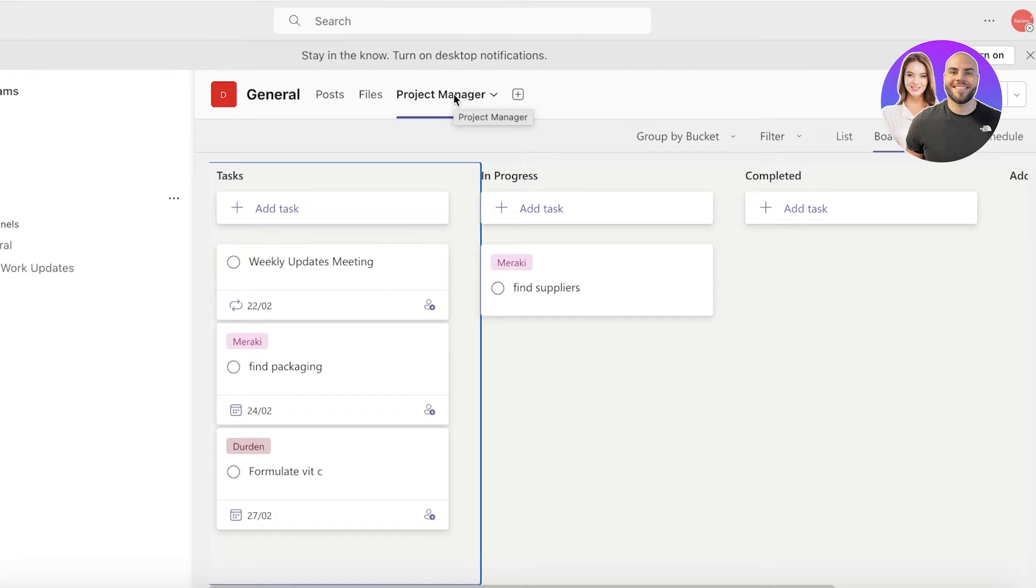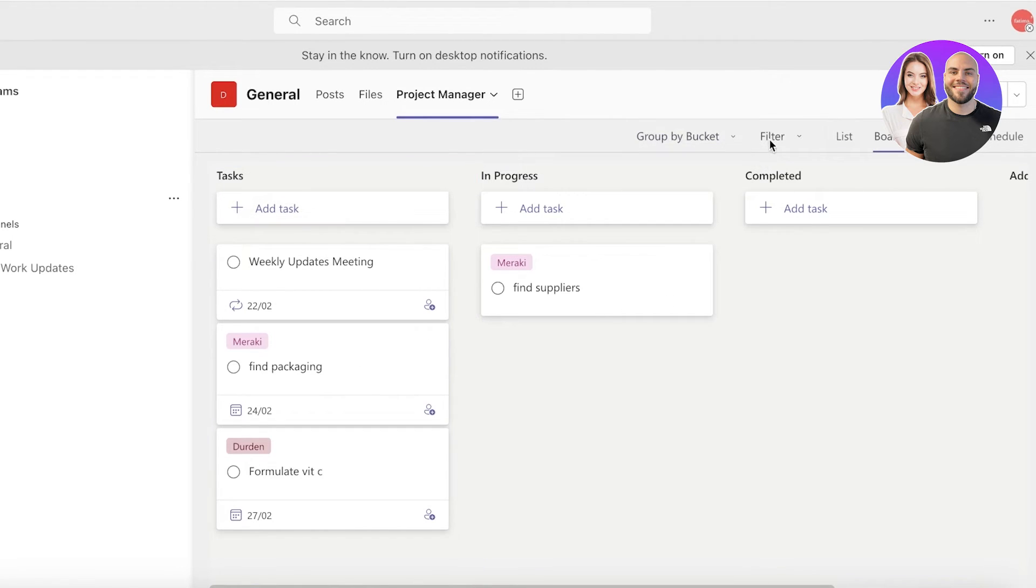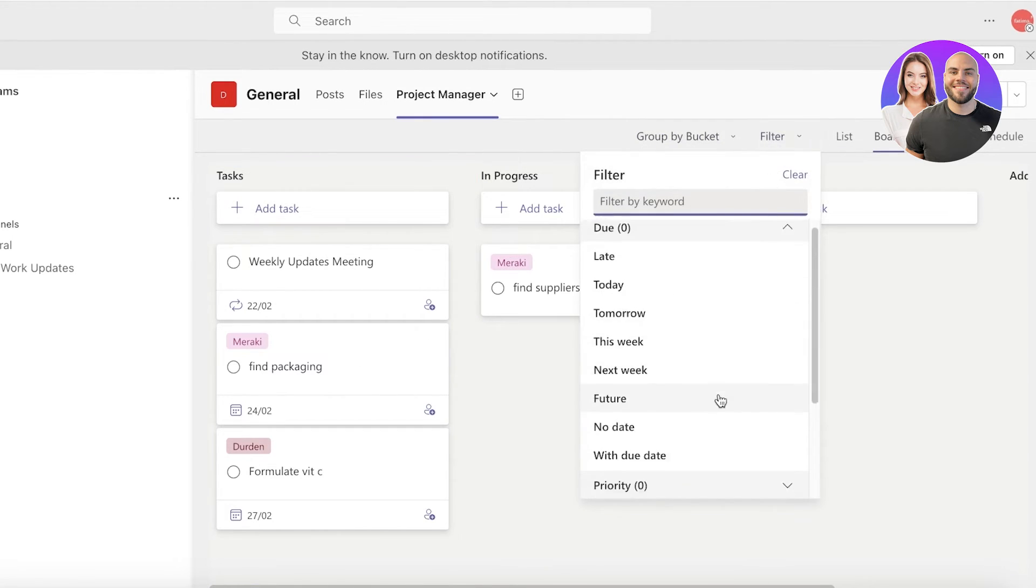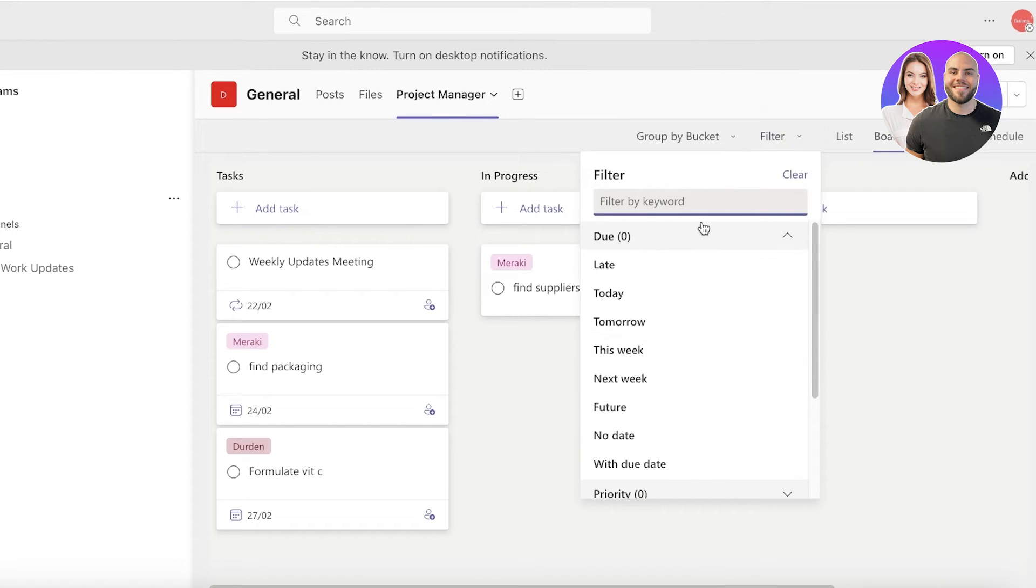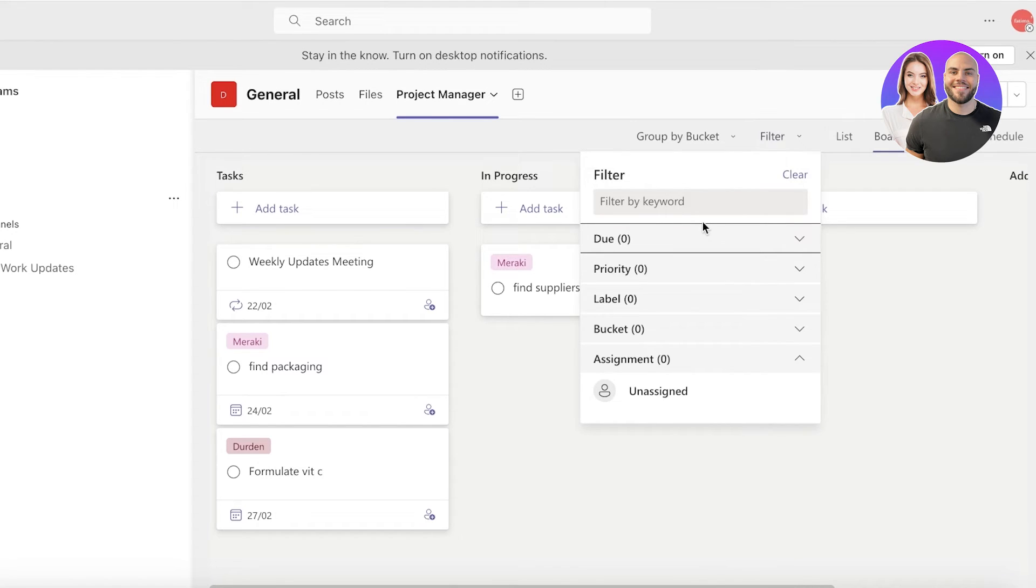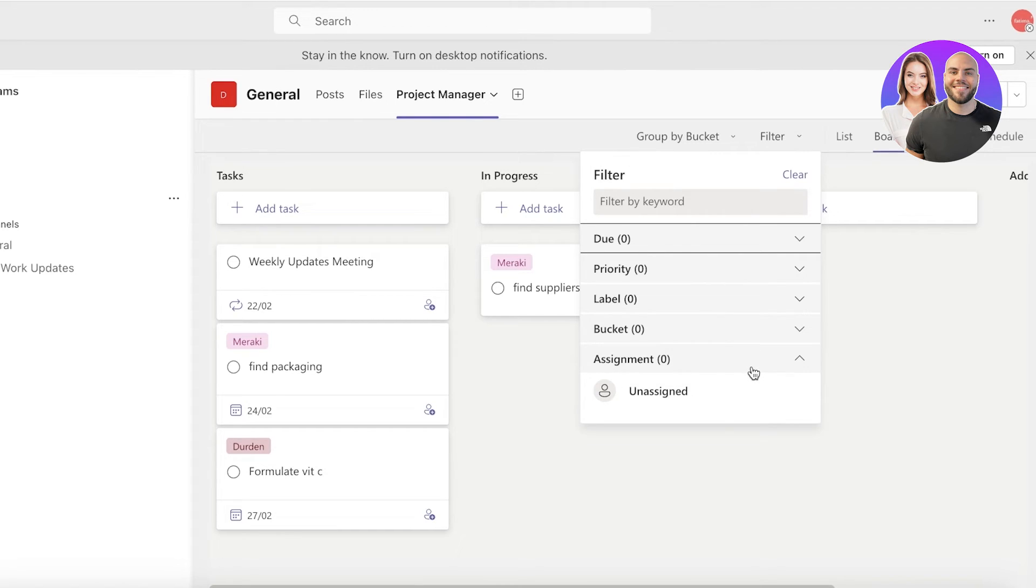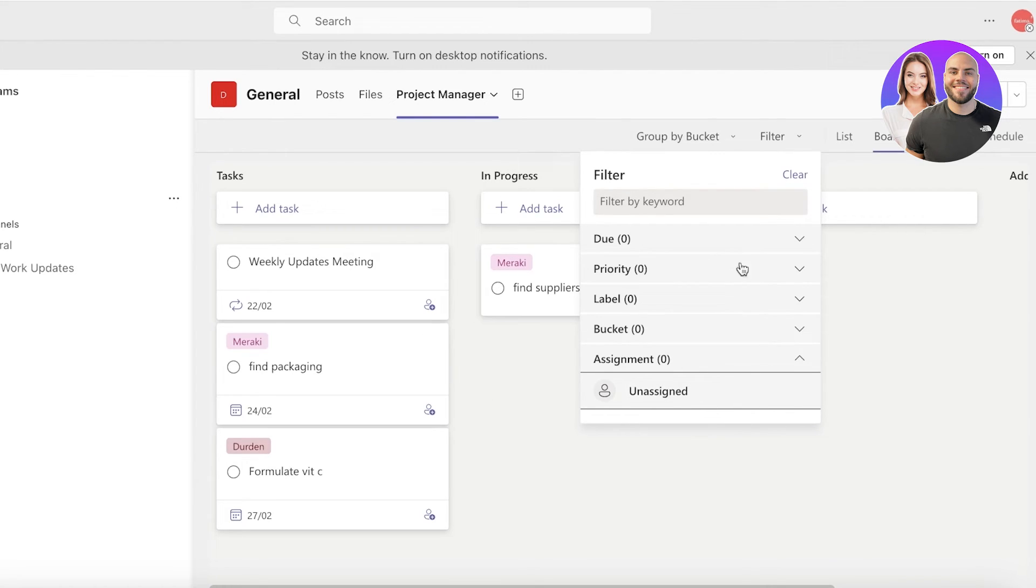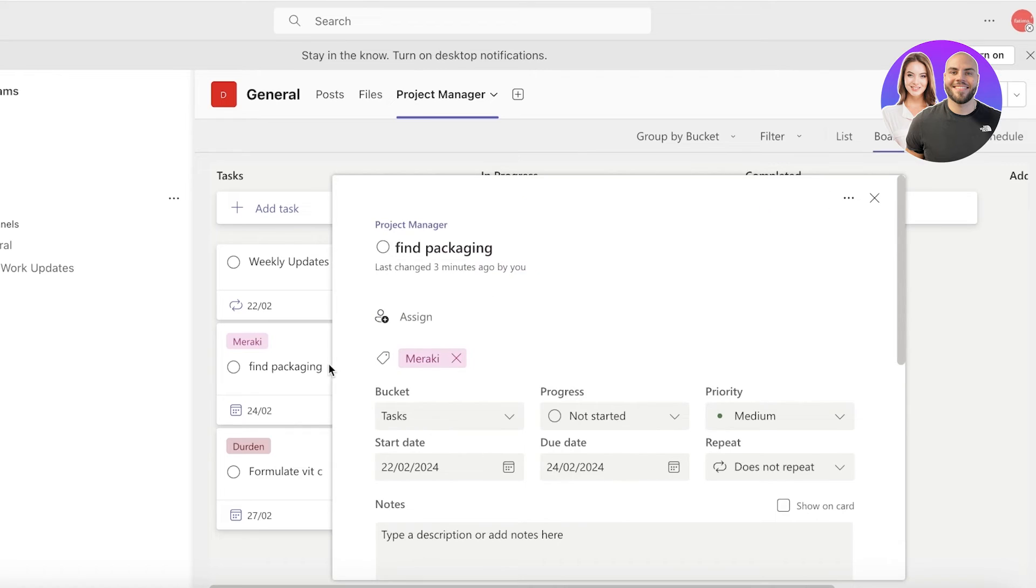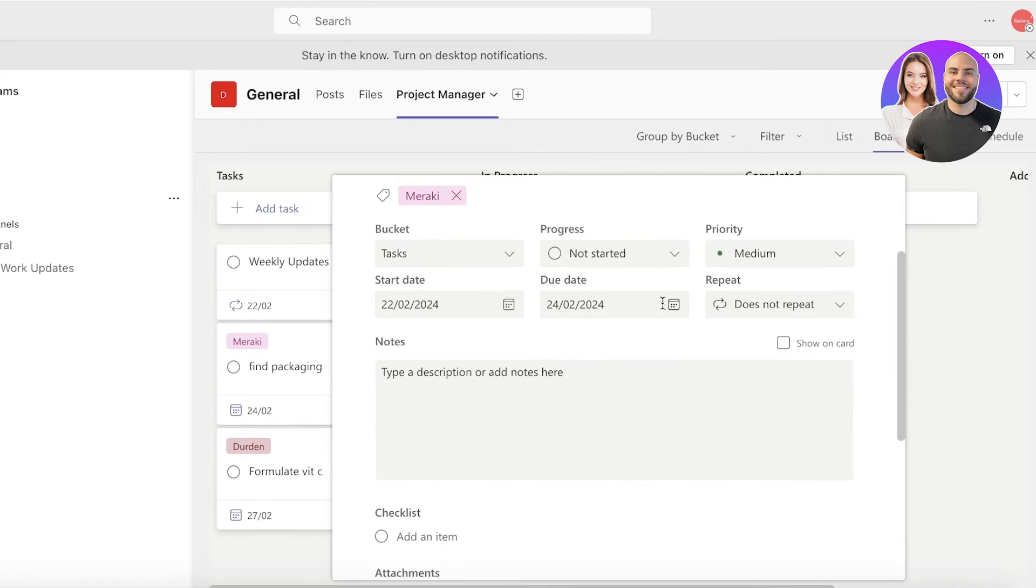Now other than that, you also have different filtration options that can help you in finding a particular task. You can filter out tasks by their due dates, priorities, labels, buckets, and assignments. But let's say I want to see what a particular employee is doing. I can just go on ahead and take a look at the assigned tasks for that particular employee, and you guys can see that you can also set progress bars.